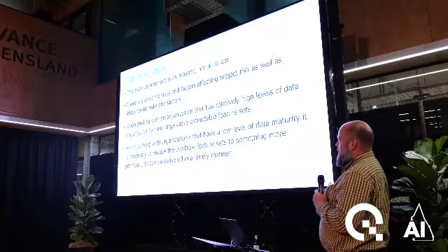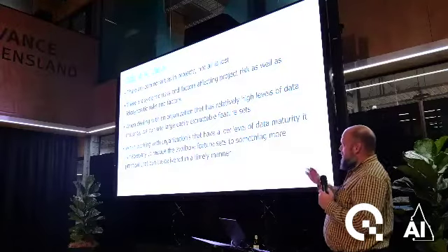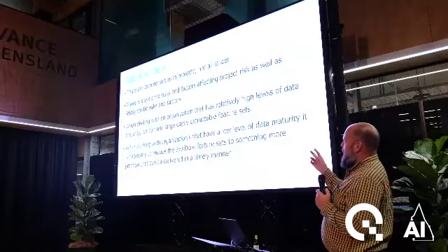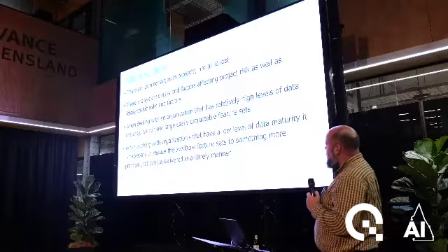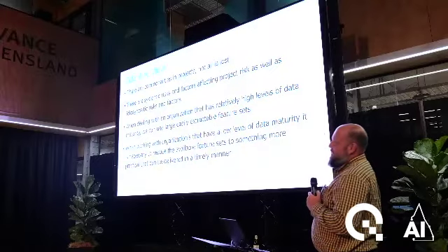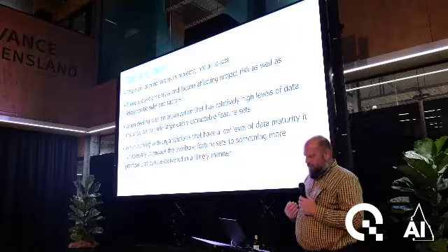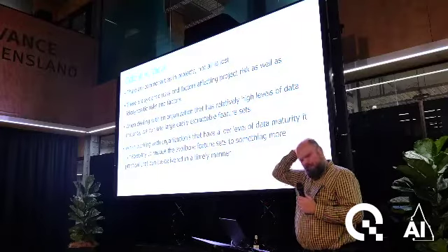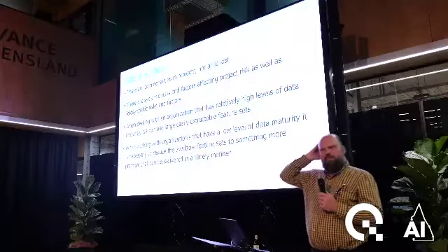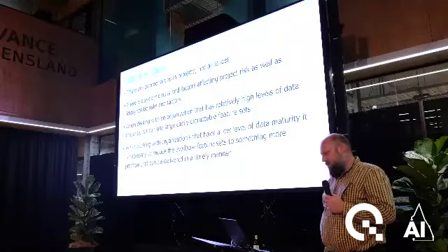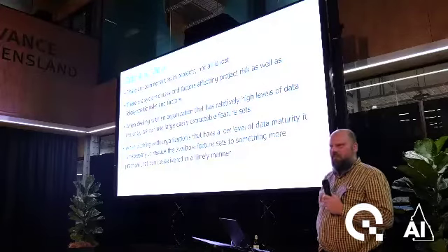All right, through a lot of analysis, using both AI or machine learning techniques and just regular statistics, we find that there are a lot of commonalities in projects. So it's not all lost. You can go back and look at historical behavior. What you find too, at least in projects, is that there are systemic risks and factors that affect project risk, as well as idiosyncratic risks. For example, a systemic risk that happened recently might be the COVID lockdowns, impacting or creating delays in projects. Whereas idiosyncratic risks would be the type of company culture, the managers that are working there, those types of things.